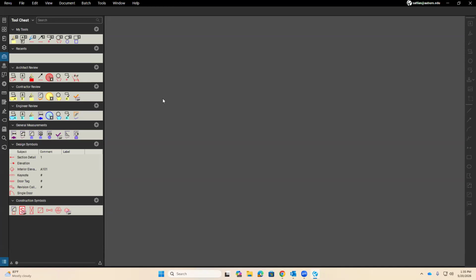But a steel beam needs to come accurate to the nearest 16th of an inch. Same thing with curtain walls, windows, doors. Everything needs to be 16th of an inch accurate. Well, doors and windows are standard shapes, so that's not a big deal. But all the structural steel that you see has to be detailed to a 16th of an inch. Hence, they're called detailed drawings and also sometimes shop drawings. More often than not, people recognize the term shop drawings.